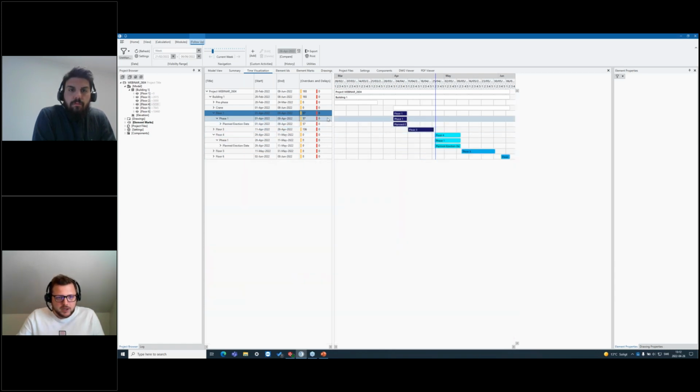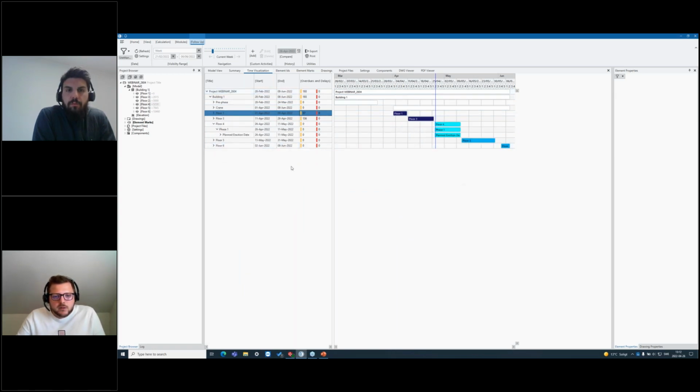And they are actually not, but it's because I was planning this project yesterday. So basically the delay is also corresponding to today's date, that we have not really sent something, while the overdue is only looking at the planned delivery day and if we exceeded that, and of course delivered it at a later day, right? Yeah, okay. Exactly. That's great. So it's to give you this quick information in real time. Yes. Impressive.